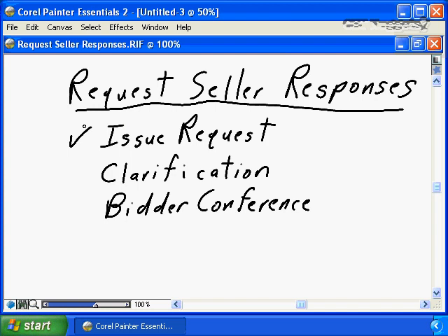This is appropriate if you believe there are qualified vendors in your local marketplace and that they will be reading the newspaper and be interested in responding to bids based on newspaper advertisement. Perhaps you need to advertise broader than that. Perhaps you need to advertise in a national newspaper to identify your request to a broader audience. Perhaps your request is very focused, very specific. Perhaps advertising in a trade magazine or enrollment in specific buyer-vendor forums will ensure that your request is notified to a well-qualified list of vendors who work in that specific marketplace or in that specific market area.